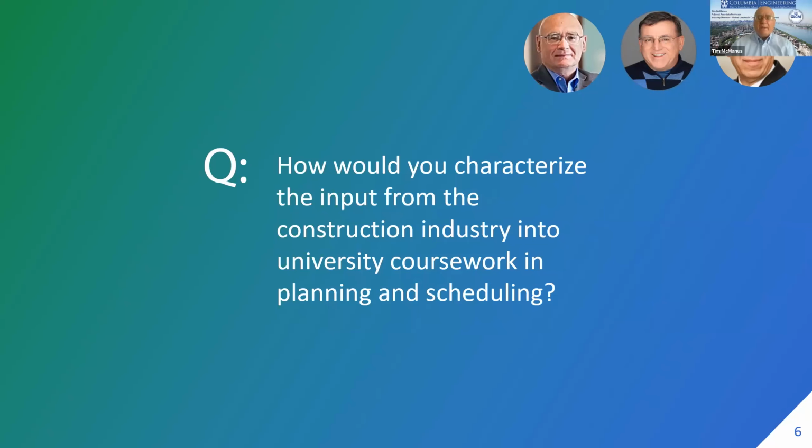However, when you peel away the first layer and you look at it, the performance in our industry is pretty poor, right? When I was at McKinsey, we did a study evaluating mega project performance. What we saw with mega projects is that on average, they experienced about a 60% delay compared to the original schedule and about a 70% overrun in budget. And when we looked at the issues causing that, it went from organizational issues, technology issues, execution, project delivery methods,